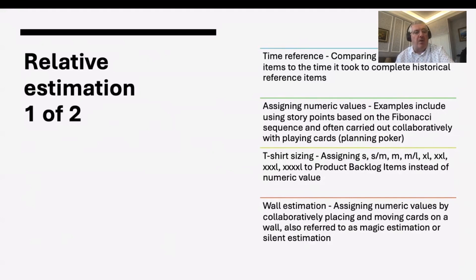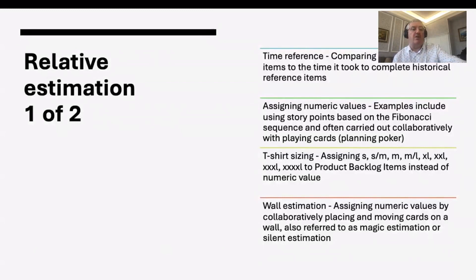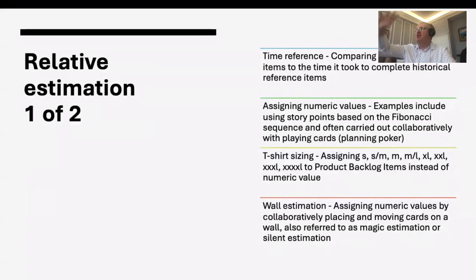Where it degrades is with planning poker. It's a nice conversation, but I think it's a waste of time. I worked with a team at a utilities company and we took seven hours to estimate a backlog. We then used an alternative technique that took 15 minutes and gave us a slightly better answer. T-shirt sizing is an even quicker way to get a size — small, medium, extra large — and you might map story point numbers to those as well, since people like numbers for forecasting.